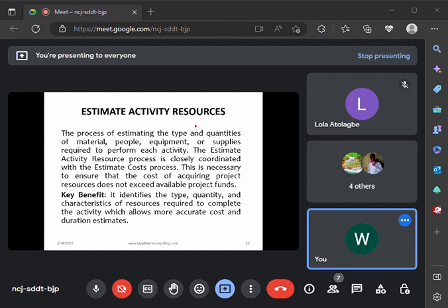Let's go back to our building project, for example, where we were talking about foundation laying. All right. So in that foundation work package, we broke it down to say that yes, there are other activities like clearing the land or performing excavation. Then after clearing the land, we map the land for digging. After we have done the mapping, we dig. After digging, we go ahead to do the blinding and pour the concrete.